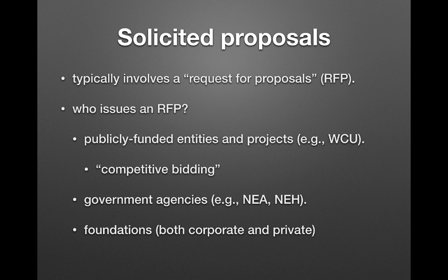And then there's a public meeting that's held, because we want to make this as transparent as possible. And the bids are unsealed during that public meeting. And typically the contract goes to the low bidder, because that's responsible use of public funds. Whoever comes in cheapest and is going to do the job, we're going to give them the contract.